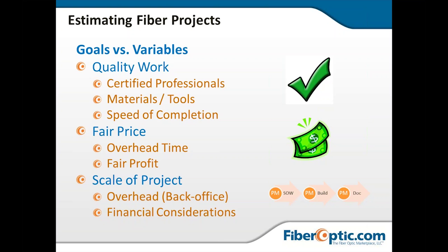Many bids out there for the municipalities require bid bonds, or they're going to hold a certain percentage of the bid to the end of the project, and even quite a bit after the end of the project for warranty purposes and things of that nature. So, are you as a contractor prepared and capable to manage the larger projects?